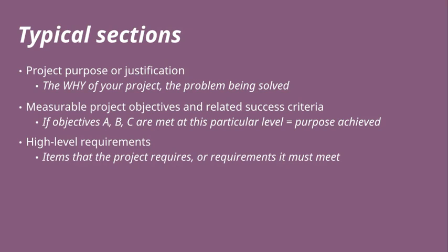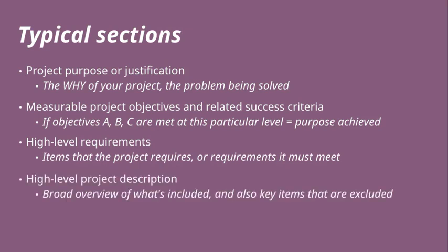For example, you can assume that for a building development, there will be some high-level requirement about meeting local safety and construction standards. Or for a new piece of software, a high-level requirement could be what operating system it might need to run on. The high-level project description is a very broad overview of what will be included in the project, and also any key items that are being excluded. The last bit is really important as well.